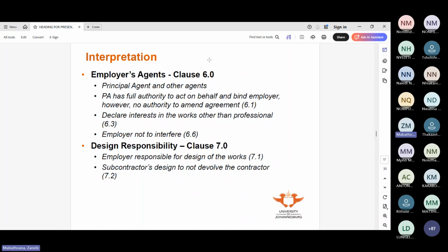Okay. So in the event that there is a clash between the bill and the drawings, the drawings take precedence. And this is where it comes from. Subclause 5.4, which says the price document shall not be used as a specification of material and goods or methods.